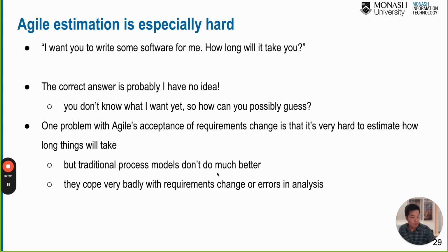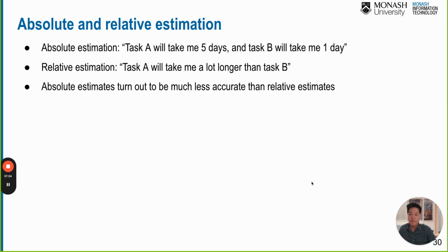But yeah, lines of code is one way, past experience is one way, but there is no single right or wrong approach, okay? It really depends, okay? And when we do the estimation, the traditional approach, they may say, okay, this feature may take like a week, 7 days. Another feature may take like 2 weeks, 14 days, that kind of thing. This is called absolute estimation, okay, because we give the exact amount of how many hours or how many days are required to complete a task.